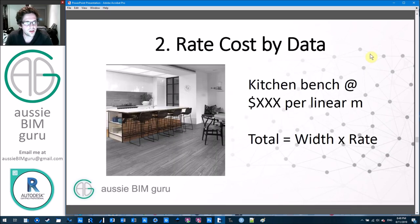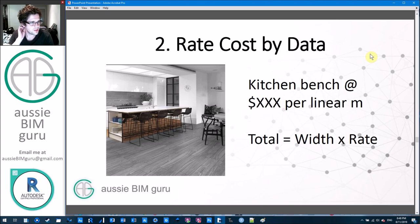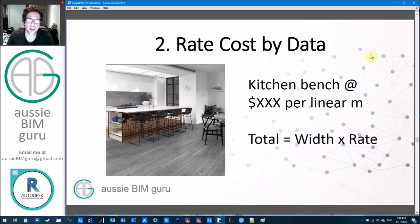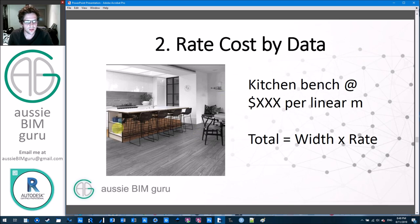Method two is what I call rate cost by data. You're still quantifying but on a different basis — you take something like a dimension of an element and use it to drive a cost. For example, the length of a structural beam: obviously the longer the beam, the more expensive because you're paying for more steel. Costing a beam on a simple unit cost is wrong because the length will differ in each scenario. You need to associate a cost rate to it, which is why having a strategy is critical.